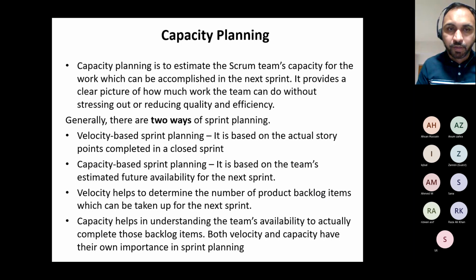Then as a Scrum Master, it's your part, right? It's your duty, it's your responsibility to bring awareness, right? Hey, look at our velocity. Here's our average, which we are delivering 35 points, but we are committing 28 points. We still have some bandwidth or cushion of 7 points to adjust. Then they say, oh, we might face some production defects or something. There must be some story that you can elaborate, or if your leadership asks later, right, you should be ready for that as well. Or they can bring more stories in the middle of the sprint to deliver. So I always bring awareness on both of these sides.